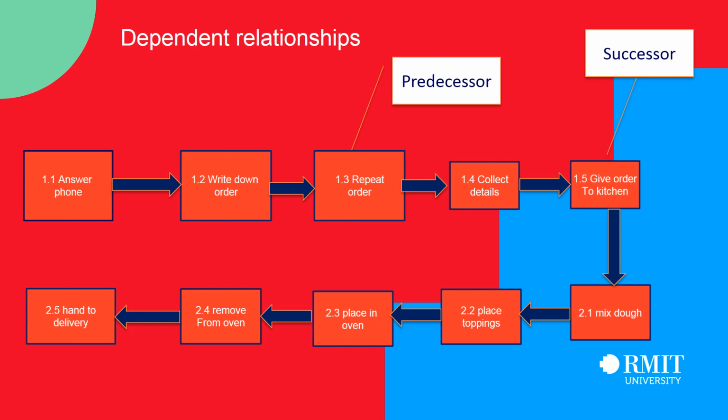The output of this step, the thing that you're making from sequencing the activities, is called a network diagram, and that's what's shown here. A network diagram is a graphical representation of the sequence of activities and the logical relationships between them. Here you can see a network diagram on which the activities are represented by boxes and the logical relationship between them is shown by arrows.